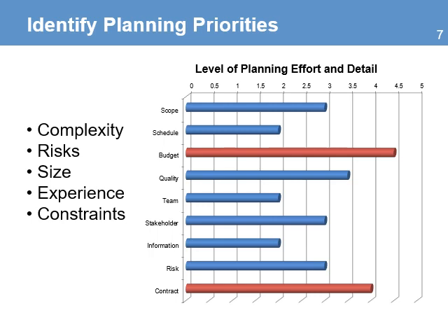On the other extreme, you find that the team and information plans don't need much effort and detail. One of the reasons could be that you have a team that has significant experience and they don't need much control, and the level of information requirement is not significant. This chart will help you organize the planning sessions by the effort required for each plan.